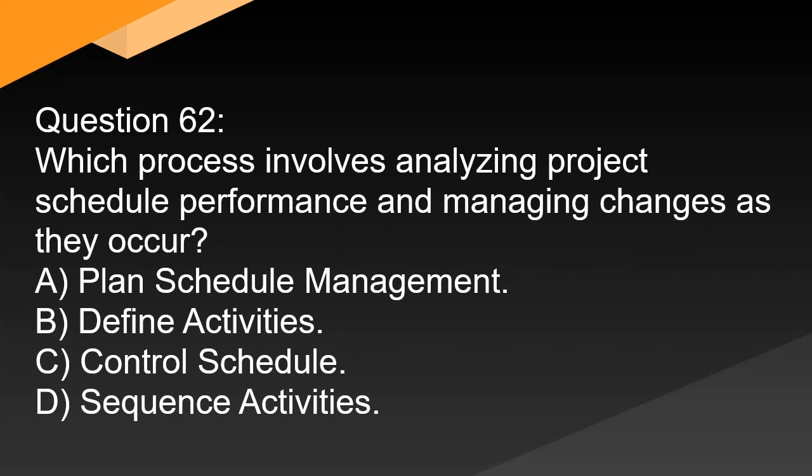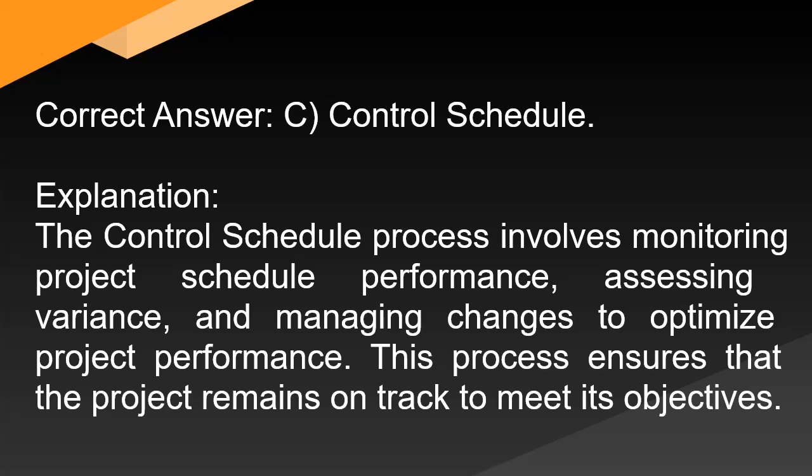Question 62: What process involves analyzing project schedule performance and managing changes as they occur? A. Plan schedule management. B. Define activities. C. Control schedule. D. Sequence activities. Correct answer: C. Control schedule. Explanation: The control schedule process involves monitoring project schedule performance, assessing variance, and managing changes to optimize project performance. This process ensures that the project remains on track to meet its objectives.